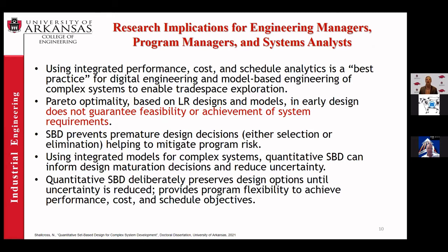And that's one, using this integrated performance cost schedule with analytics, we've found that it's a best practice for digital engineering and for model-based engineering, especially because for complex systems, it's going to enable a greater trade space exploration. Two, we found that when you consider low resolution designs and models, in early design, the Pareto optimality that you find doesn't always guarantee feasibility or achievement of system requirements.